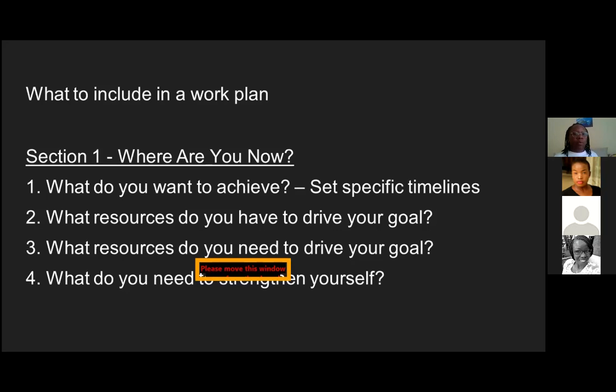So every time you're doing the project, it's broken down from the bigger 10-year plan, 5-year plan, then 1 year, then in the 1 year, 1 month, then weekly. What are you doing in your weekly day-to-day activity? That's how our work plan looks.